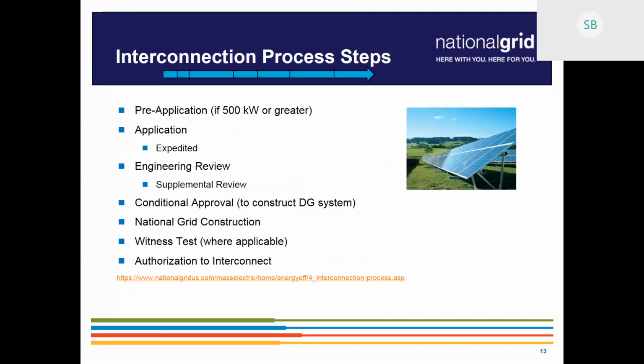The interconnection process steps: we start with a pre-application if over 500 kW. The application review, screening process, and the engineering review will occur simultaneously.